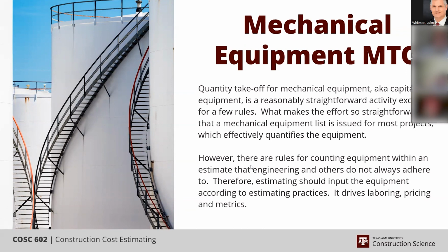Well, the reason that's a little bit of a thumbs-up, high-level kind of approach is that one building may have one bathroom per floor and the next building may have two. So you've got twice as many fixtures and twice as much plumbing for the same square footage, depending upon how they designed it. On the other hand,